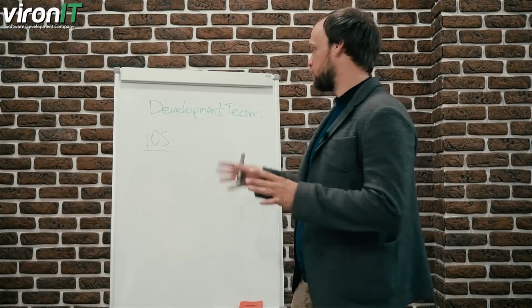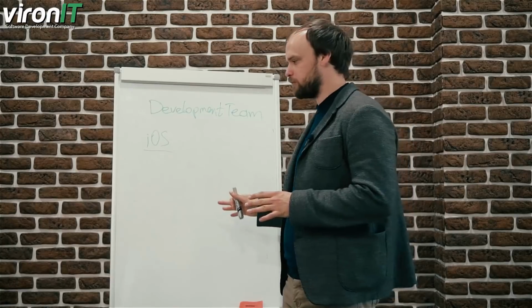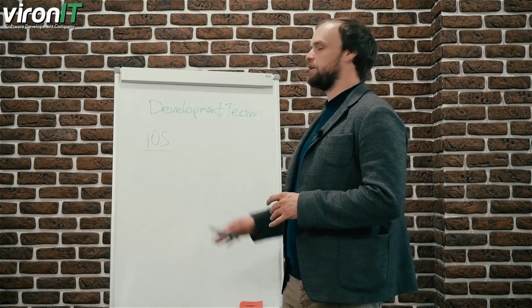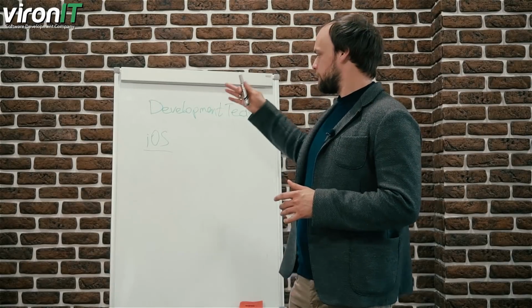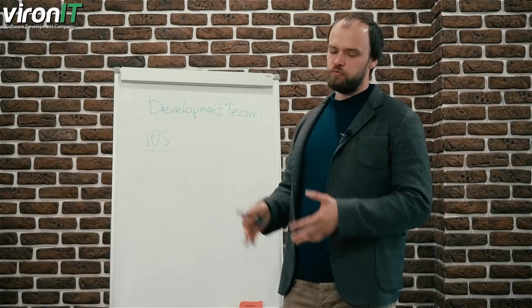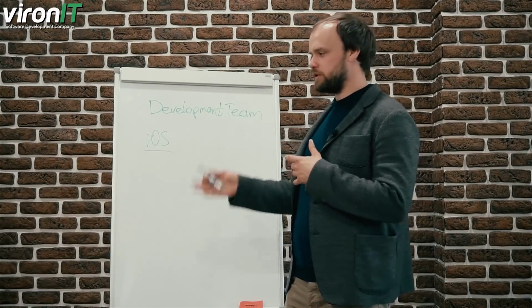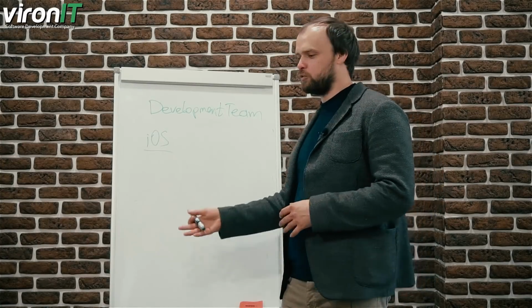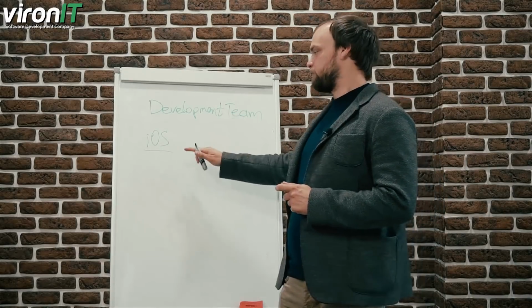We advise to start with one platform. And why? Because when you start developing for one mobile platform, I haven't seen any project in my life where there were no change requests inside the project. So when you start development, there are new features going on. You rethink your understanding. You understand what's really required, what is not required, what to include, what to exclude from the list. We strongly advise to start development for one platform.